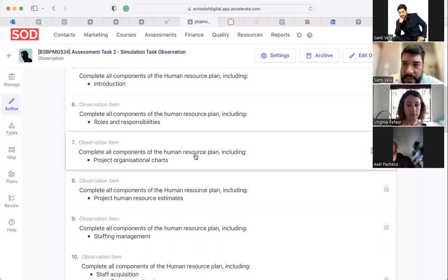The lessons learned is the document that you use, because that will tell you if last time the selection you did in terms of human resources was appropriate, was a plus, was a positive, or on the other hand, it was not, which will be reflected in the lessons learned register document of your previous project. And that is the data and information that you go through before you estimate the human resources of a current project. Wow. Extremely impressed. Well done.